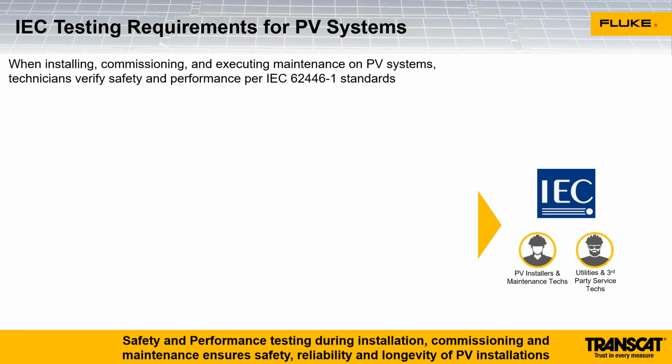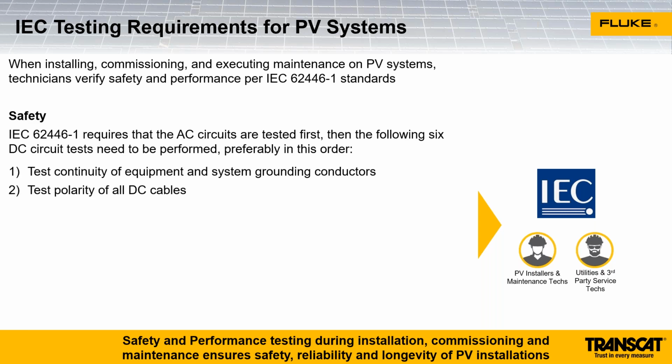Now let's get into the IEC testing requirements. This is standard 62446-1 for the installation, commissioning, and maintenance of PV systems. Now, here in the United States, the standard is not required. It is a very good guideline. In Europe, this is a statutory requirement, so you have to do the testing to this standard.